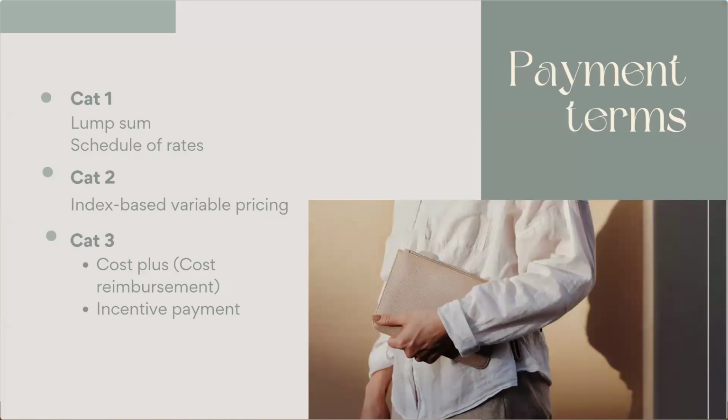Finally, let's look at different payment terms. There are different arrangements for payment, like we could specify the total sum of the contract under the lump sum contract, or we can prepare a pricing schedule or the schedule of rates. Under this schedule, the party agrees to a certain unit price of an item, and the supplier may charge the buyer based on that kind of unit price.